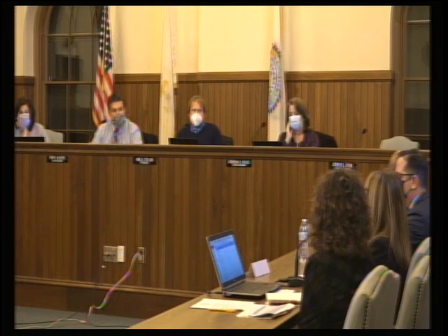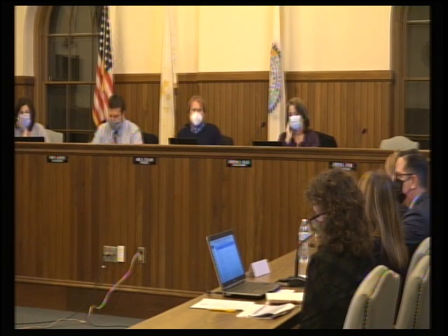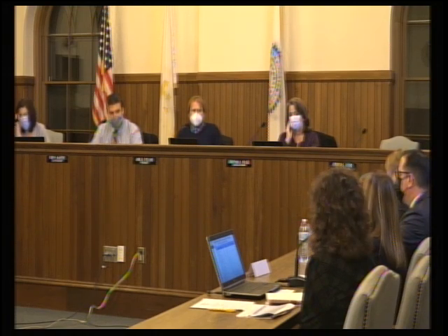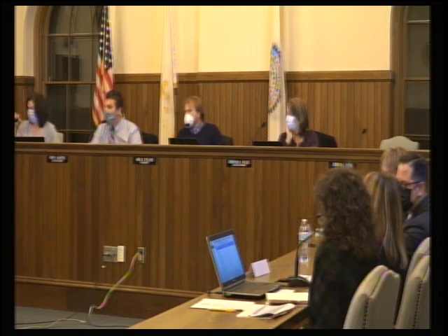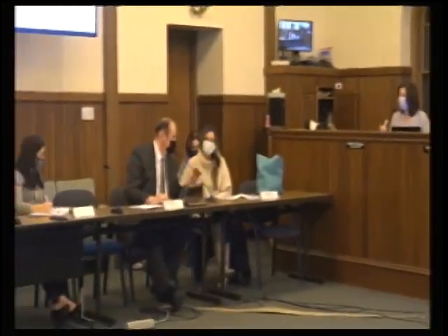Do you know what the date is currently, before that bill passes? If we were to look at the current approved stage 2 application that we have, I believe that it needs to be started, and I'm not sure, but if I just had to guess, it would be December of 2022. But that is just off the top of my head, and I'd have to, again, talk to RIDE to make sure that was accurate. That better? The discussions that we've been having, particularly with Dr. Pilata and the building committee, the anticipation without the legislation passing is that you would have to have the approval into RIDE, or the application into RIDE, by February, and shovels in the ground in December of '22. Thank you, Mike.